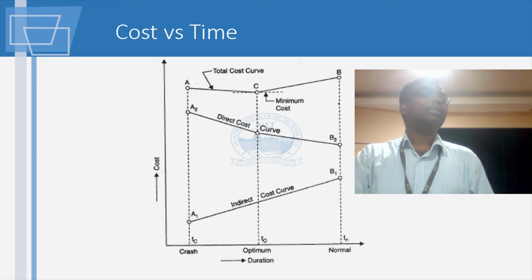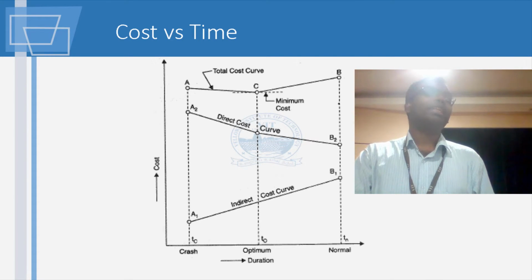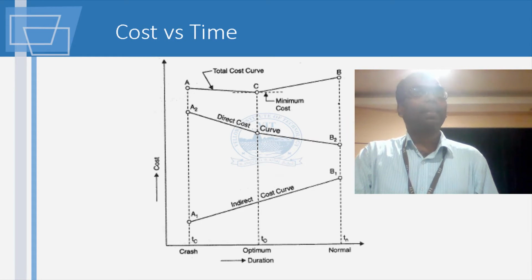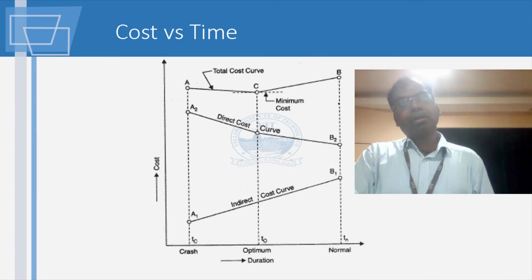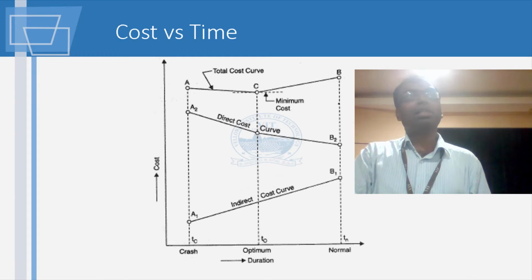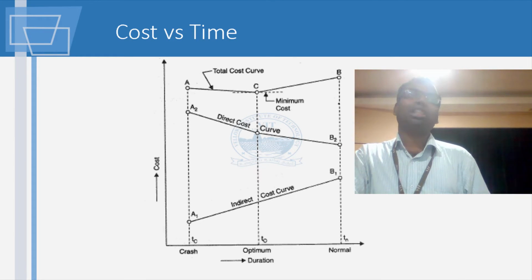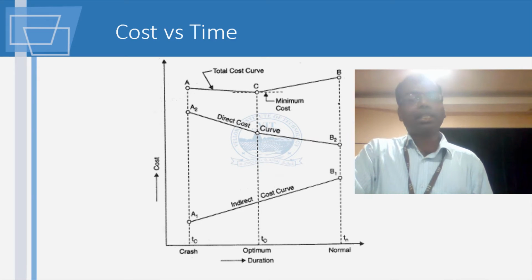When will that happen? Where the contractor deliberately slows down the project. Lack of fund is also correct. What happens is sometimes the buyer will stop making payments. Once a buyer stops making payments, you are apprehensive to do the job. So at that time also they will try to stretch the project a little.